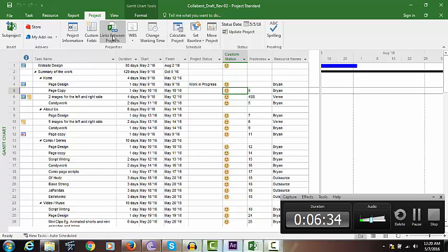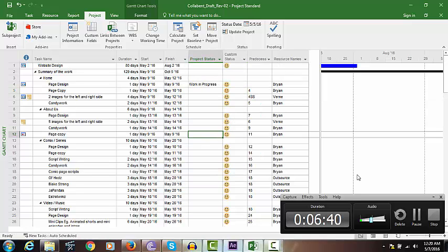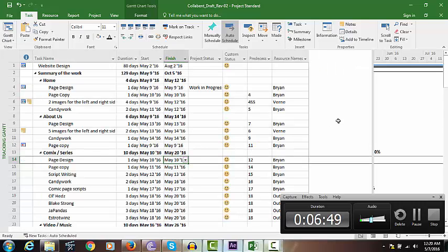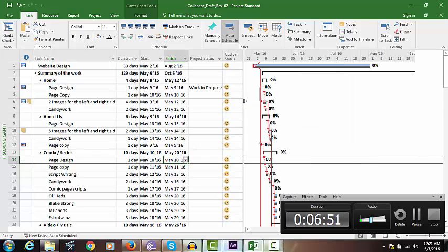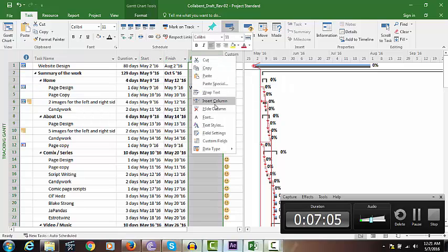And now after this you can fix this as a baseline. So on this date I am showing it as a baseline. Now you can view it in the tracking Gantt. So now you see there is a tracking Gantt where the entire durations are being shown here, and based on the status of the work, you can start updating in actual start and actual finish.